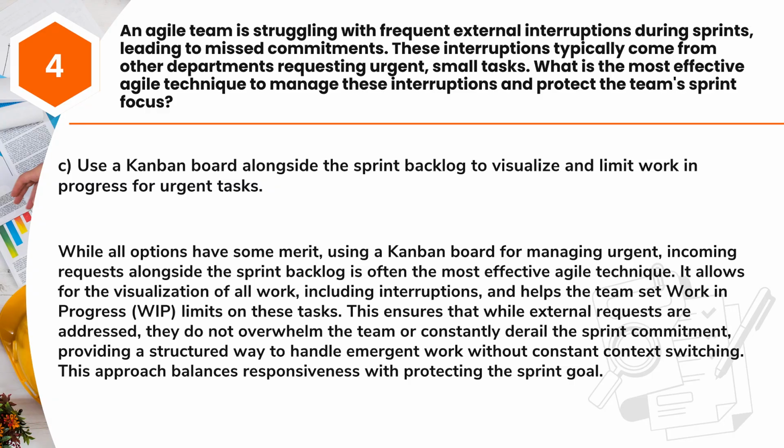Answer: C. Use a Kanban board alongside the sprint backlog to visualize and limit work in progress for urgent tasks. While all options have some merit, using a Kanban board for managing urgent, incoming requests alongside the sprint backlog is often the most effective Agile technique.